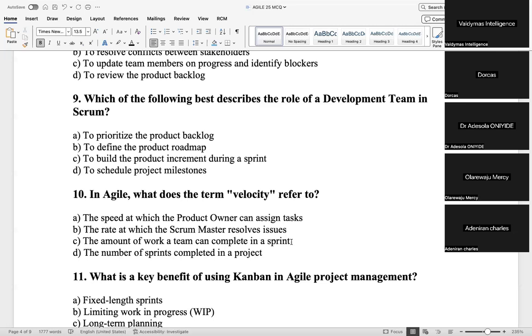Because I did that, and that's the essence of your retrospective. In retrospective, you're supposed to do that RCA to know why your morale dropped. What dropped the morale of the team is that management removed 2 members of our team. It came in abruptly for us. We didn't plan well for it. They moved them to another team. I think one was relieved of work and one was moved completely. The company was going lean. So they removed 1 person, they moved another person to another team.